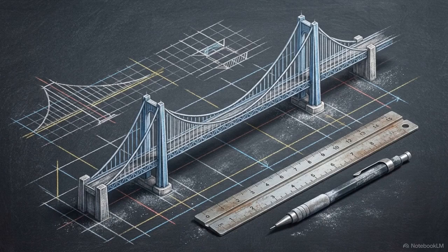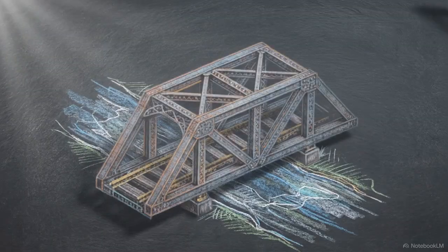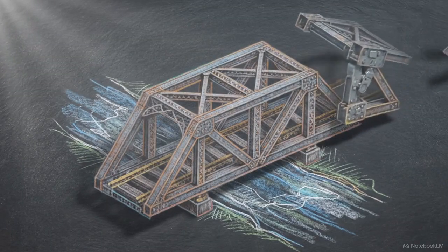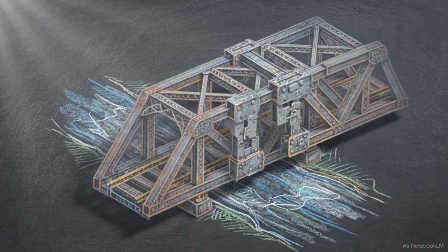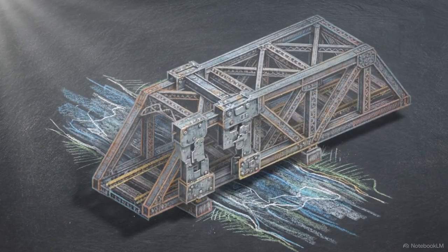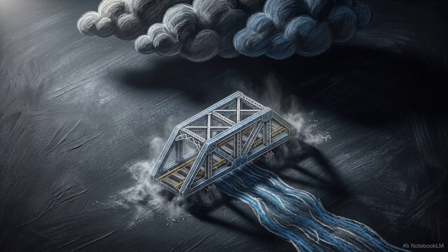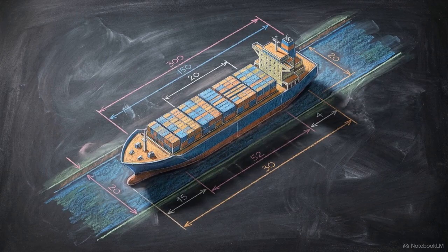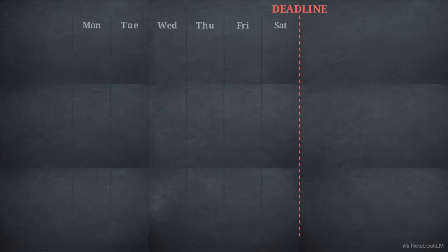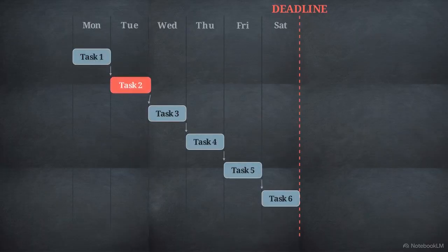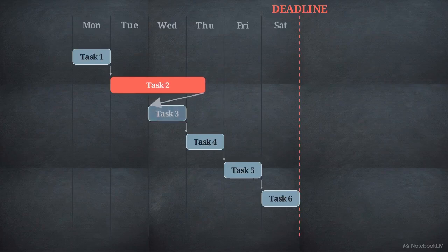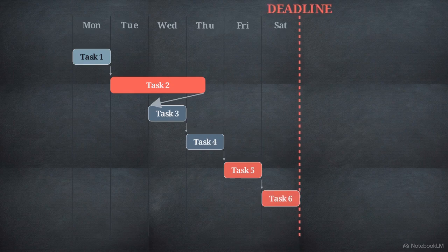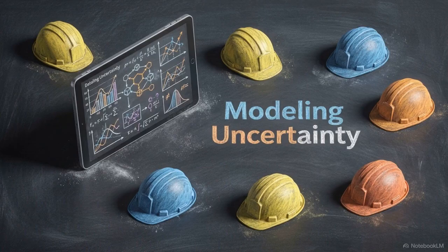In traditional construction planning, the critical path method assumes that a schedule is deterministic. If you are building a massive steel bridge, the model requires a precise, fixed time estimate for every piece of the project. But large-scale engineering does not operate in a vacuum. Projects face systemic uncertainty, severe weather, supply chain disruptions, and human error. In a deterministic model, a single unexpected delay on a Tuesday creates a cascading geometric shift that pushes every subsequent task off its scheduled mark, ruining the entire timeline.